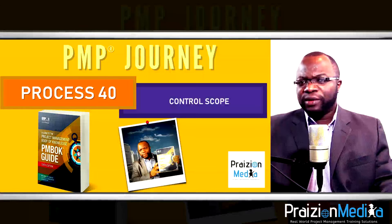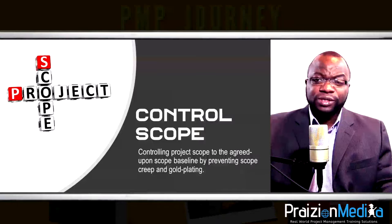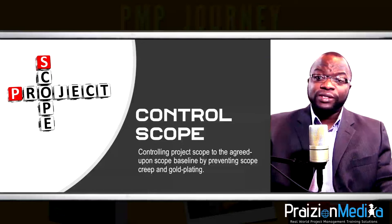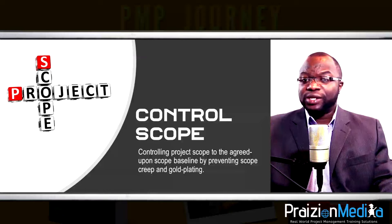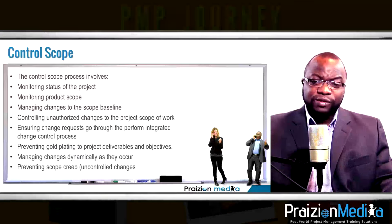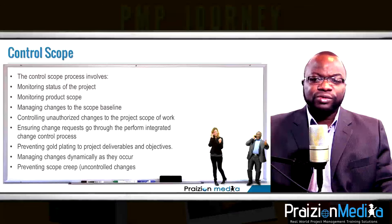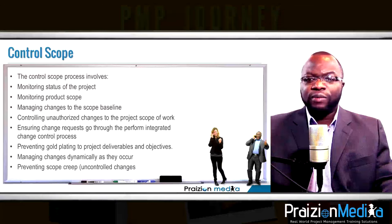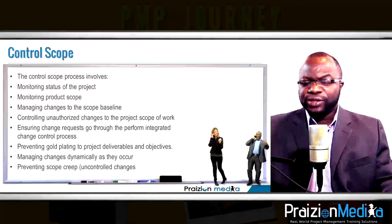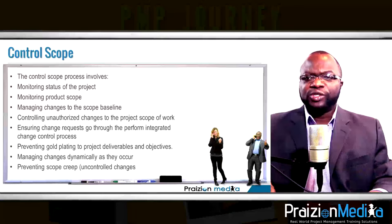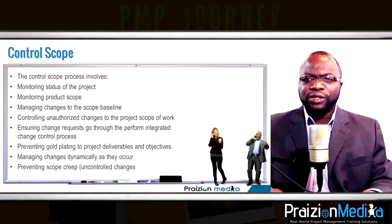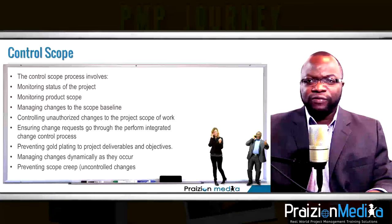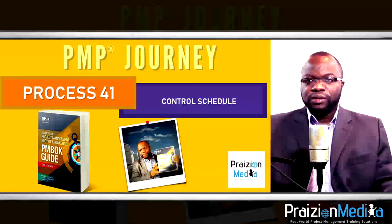Process 40: Control scope. Have you ever heard about gold plating — adding extras that are not needed and were not authorized? In control scope, the project manager ensures no one is adding extras and there's no scope creep. If someone tries to add extras, those requests must be funneled through the perform integrated change control process. It's not uncommon to find opportunities to add extra benefits to the customer, but all of this must be done in a coordinated fashion.